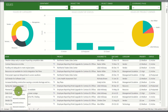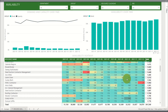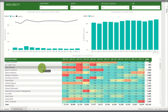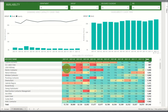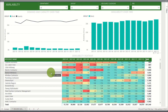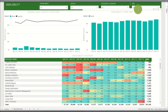Next we go to the resource availability report, where we can see a summary of capacity versus demand against each of our resources. A heat map appears at the bottom of the page showing the remaining hours per resource. In this example, Lydia Holloway has minus 25 hours available in January — meaning she is over-allocated — however Sheena has 160 hours available in January, so decisions can be made around where to move tasks based on individual user availability. This can be filtered by specific departments, groups, and a custom resource breakdown structure.